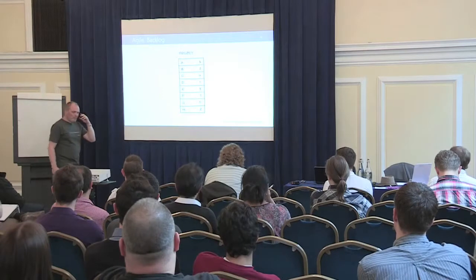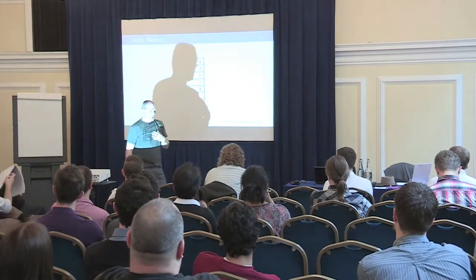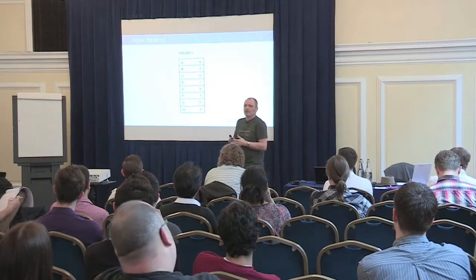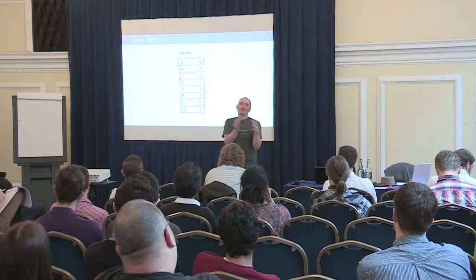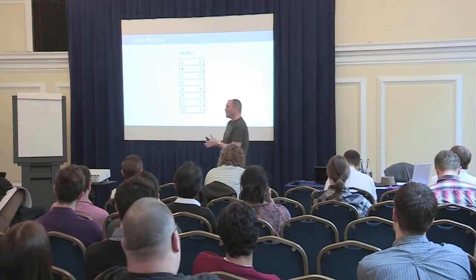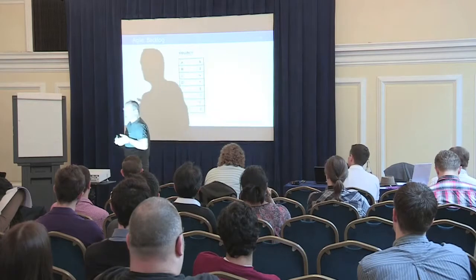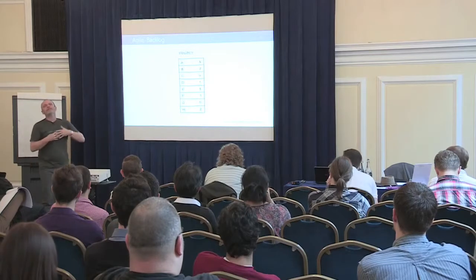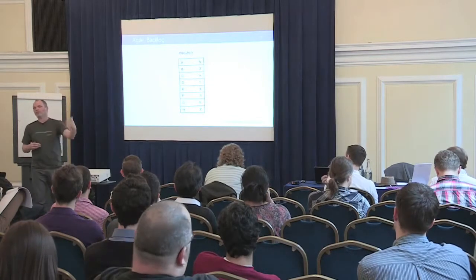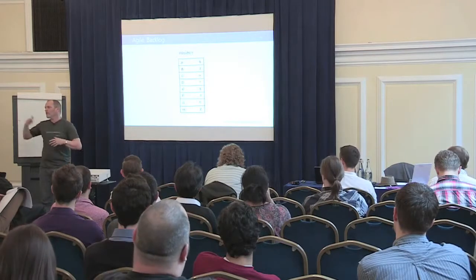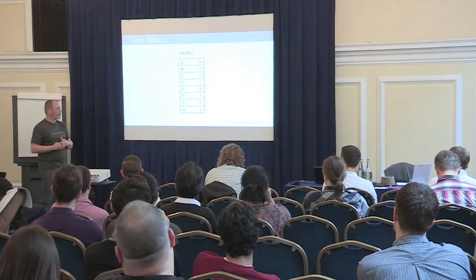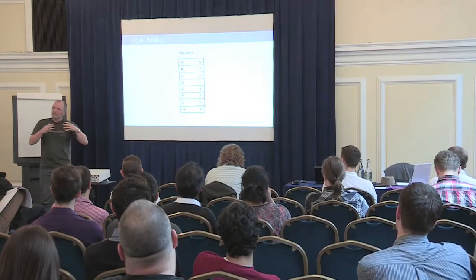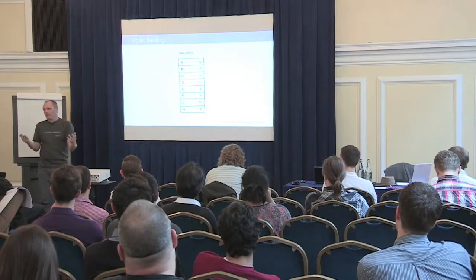So basically, an Agile project usually starts with a backlog. And a lot of these Agile approaches just say, okay, you're going to start a project, the backlog is already there, right? So the backlog is basically a list of the things that you can do to get to the end of the project. It's the functionality that you need to build. It's the other work items that you need to do, such as set up your development environment, set up a test environment, think about UI guidelines and whatever you might have. Think about a baseline architecture, getting your requirements out, stuff like that. So there's basically, I would say, two types of work items in projects.